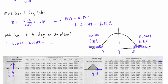That calculation gives us 0.8638, which is 86.38%. So there's an 86% chance of this activity finishing between three and five days in duration — which is actually a pretty good chance. You can confidently say the activity has an 86% chance of being between three and five days.